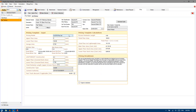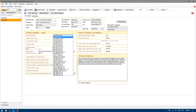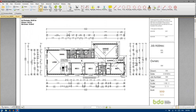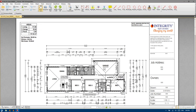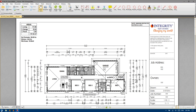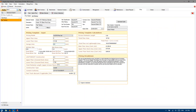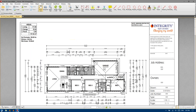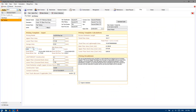First and foremost, double checking the pricing model is the most current — July 2016 was our most recent 1% price increase. Then we go about filling in these areas. Being a single storey slab on ground house, it's relatively easy — like for like. So living, lower floor: 111.98, garage of 23.24, kitchen of 5.46, wet area of 16.99.